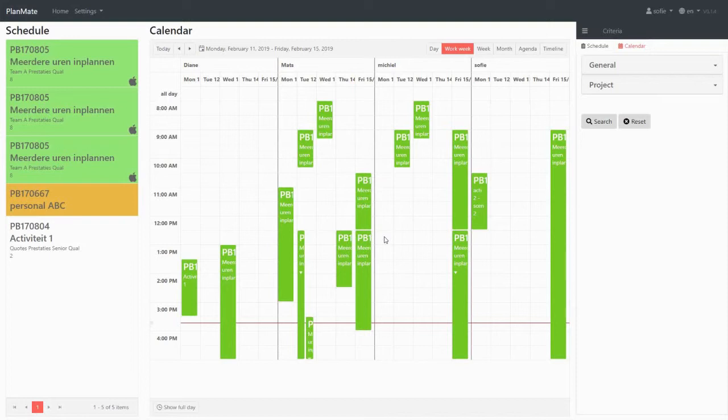Like you said, Kees, it will use the remaining workload and make a new appointment of that, which you can do all the things with that you can do with a normal event or an event that already existed. It's more integrated also in realization, because one of the advantages I see is the question in department planning: if you plan 4 hours and you did 2 hours, what do you do? We always say, yeah, it's planning, just leave it. And here you can plan. You can say, okay, I worked 2 hours on it.